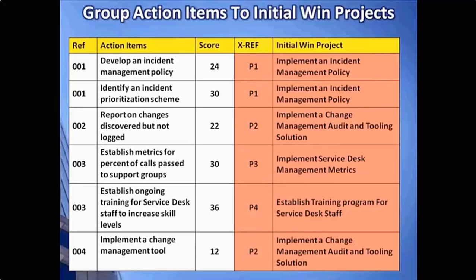The XREF column is really just a reference to the initial win project. So think of it kind of like a project ID, and it's just listed there so it's easy to reference back to the initial win project that's there. You can kind of see how this is being done. If we look at the first two action items, develop an incident management policy, we've said that we need to implement an incident management policy as an initial action item. And we've given this ID of P1, or Project 1.